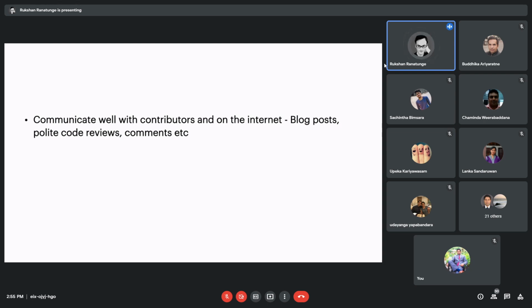So ultimately what we did was we deployed the two systems parallelly, the old system and the new system. And the old system had a link saying, if you would like to try the newer system, you can go by clicking this link. So some people who liked the newer version were able to go to it by clicking the login link, and people who liked the older system were able to keep using it.